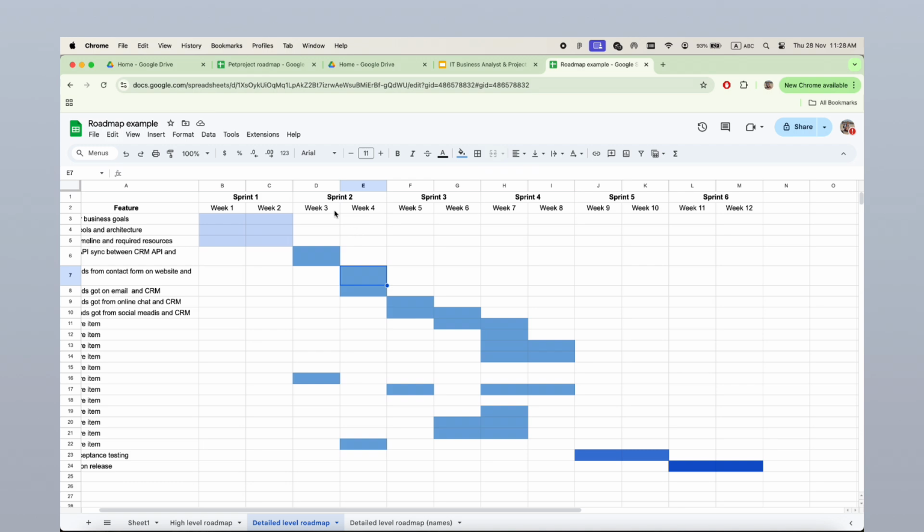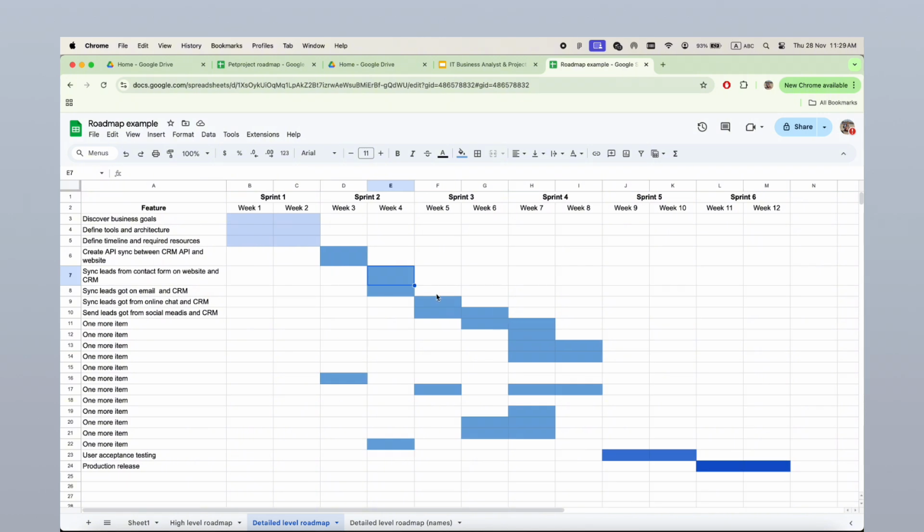And if you as a project manager cannot define the dependencies yourself, you just need to talk directly to your team and discuss with them what tasks should go first, then estimate them and reflect on this detailed view roadmap. I will attach this template for your reference in the resources section, and you can download it and adapt it to your own project needs.